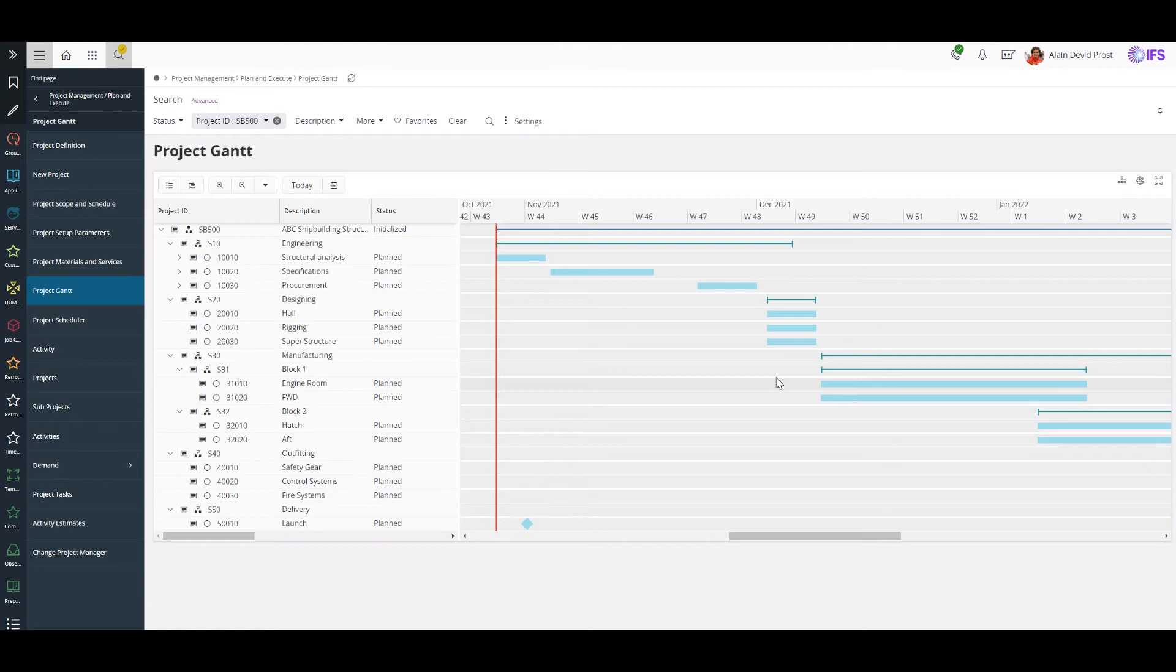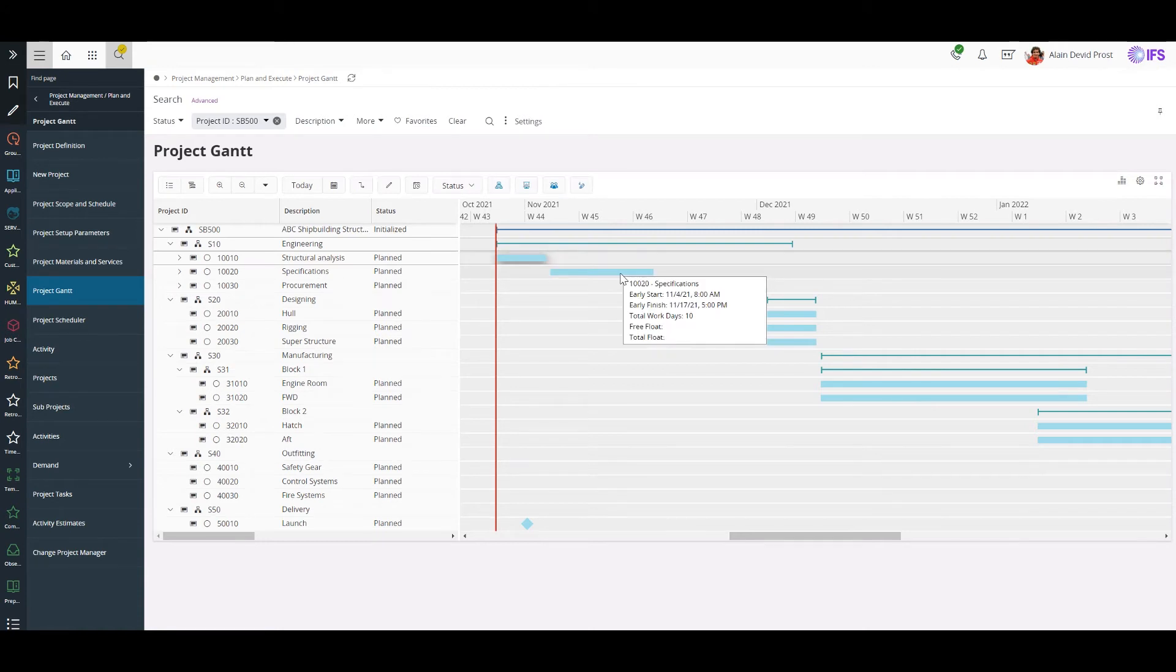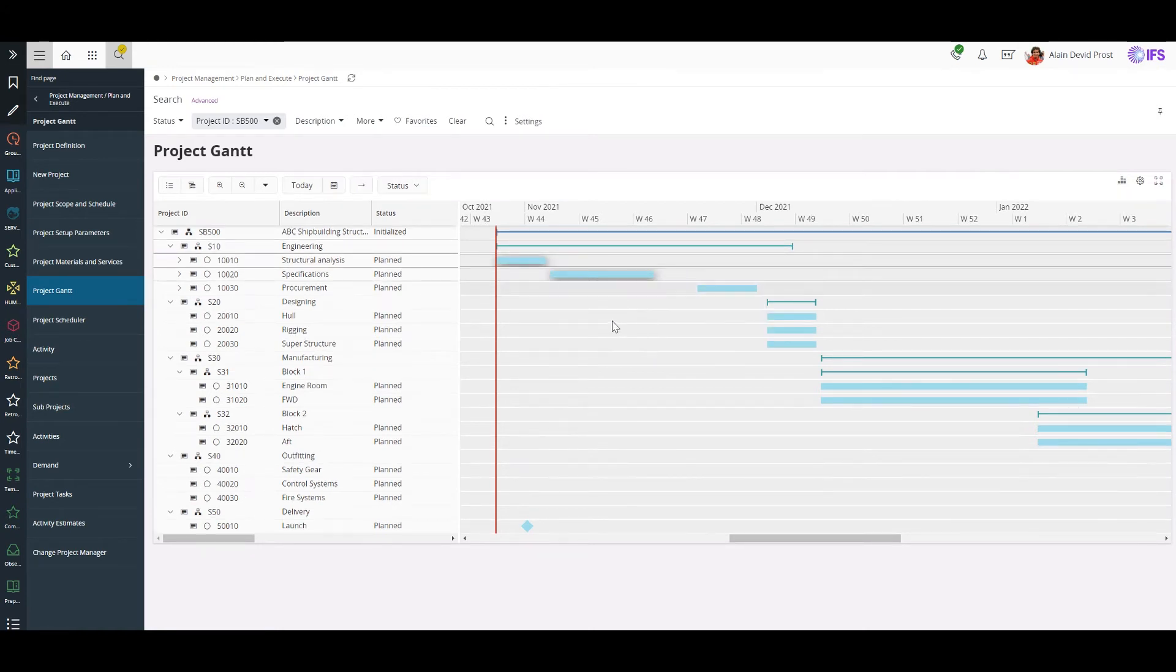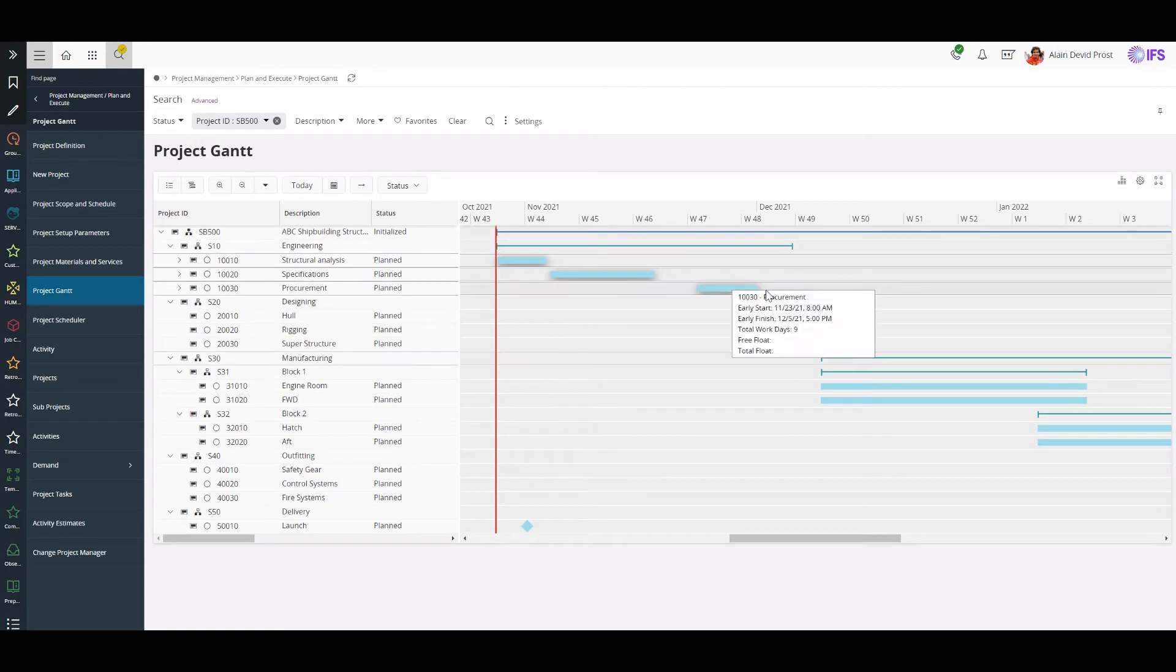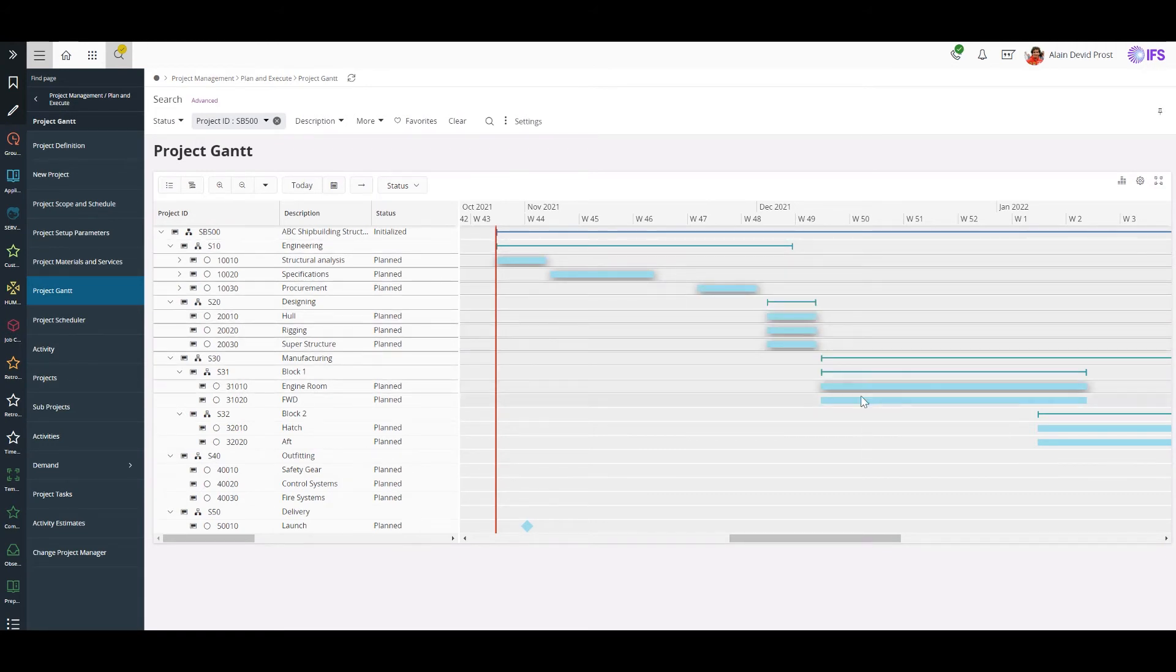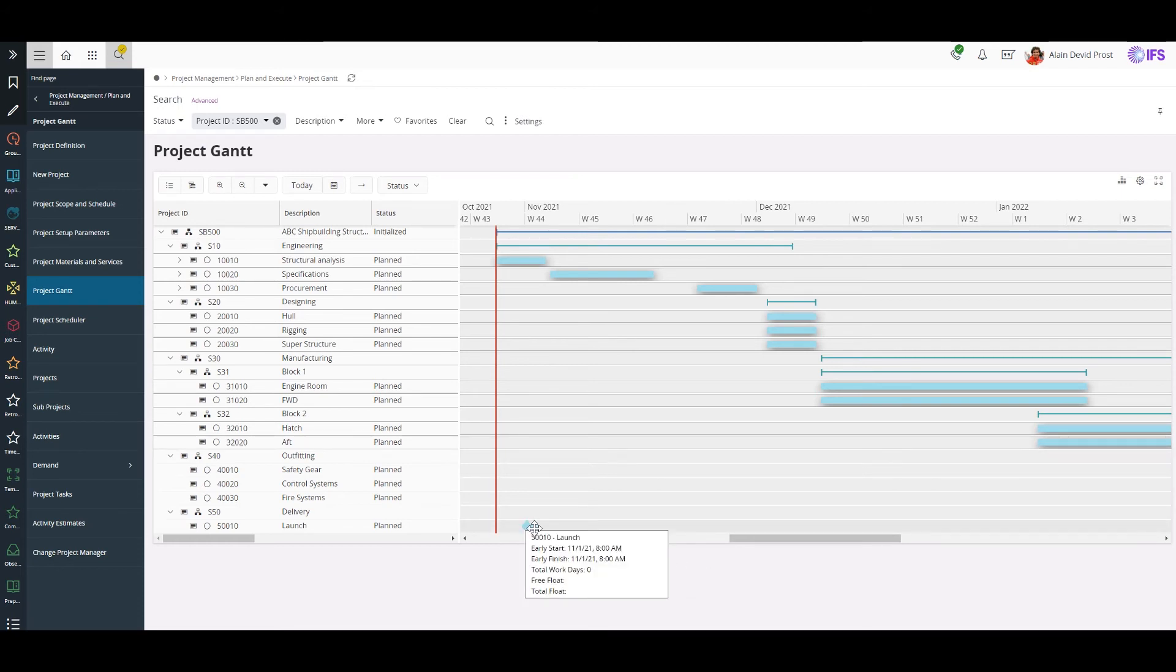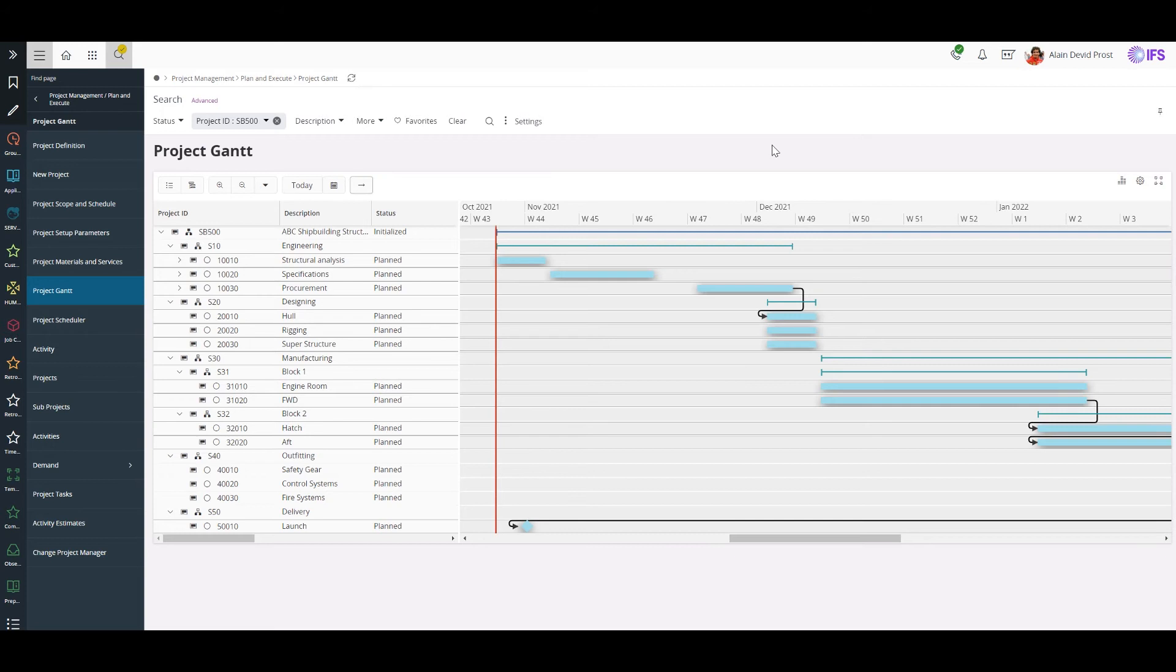Let's create the dependencies between the activities of my project. We can do it by selecting two activities which we are planning to create dependencies. In my case, since there are a few more sequential activities, I will select all of them to create dependencies just by one click. Now my project WBS is updated with the dependencies.